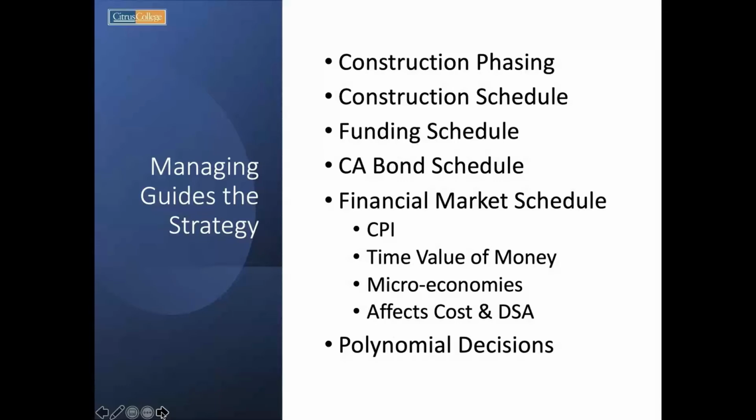If you have, say, San Francisco City College, if they go out to build something, their cost of building is a lot higher up there than it is for us down here in northern Los Angeles County, simply because materials are harder to get through the city. Labor is harder to come by. Maybe they have other problems that they have to deal with, like a PLA or stuff like that. All those things have to go into when you plan your construction schedule and lay it down, overlaying the funding schedule and thinking about all those things.